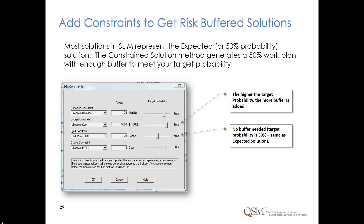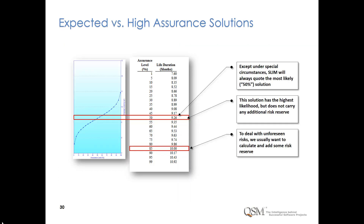Most solutions in SLIM represent the expected or 50% probability, but you can add constraints to get risk-buffered solutions. The constrained solution method generates a 50% work plan with enough buffer to meet your targets at the desired probability. For example, even though we calculate that a project can be completed in 9.26 months, we commit to the customer to deliver in 10 months. This gives us about 3 calendar weeks of reserve to respond to risk. Without this risk reserve, the moment one problem compromises the schedule, we are in danger of overrunning and not fulfilling our commitment.